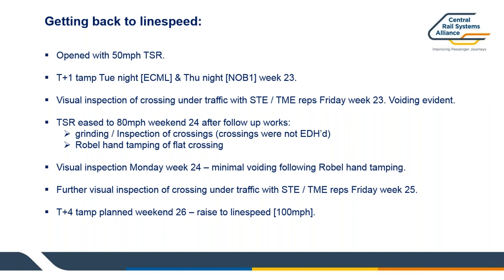So the first two castings they did were basically destroyed because they weren't actually fit for purpose due to these cracks that had occurred. The reason why we actually decided and went for a non-EDH was that the speed that they could actually look at where these cracks were coming from and why they were occurring would mean that they weren't able to meet the lead time to actually allow us to produce all 8 crossings. So we had to actually look at a compromise, because if they carried on EDHing the crossings each time, there was a possibility that we'd still get the cracks again appearing on the actual nose. And obviously that would mean that we'd just reject that crossing itself. So we're back to square one again.